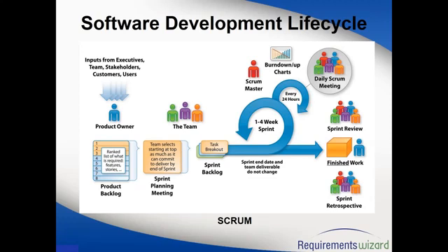Lessons learned means if I have successfully completed the project, then whatever estimation I have done, what resources I have taken, like some resources had training, all that kind of stuff should be there in the lessons learned. If the project is not successful, then what are the reasons for not having a successful project? What problems did we face during execution, like requirements not being clear, or a couple of requirements missing, and all that kind of stuff.